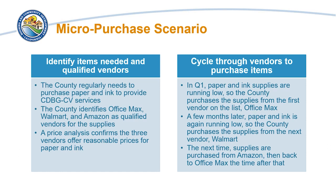In this scenario, the county regularly needs to purchase paper and ink to provide CDBG-CD services. The county identifies OfficeMax, Walmart, and Amazon as qualified vendors for the supplies. A price analysis confirms the three vendors offer reasonable prices for paper and ink. In quarter one, paper and ink supplies are running low, so the county purchases from the first vendor on the list, OfficeMax. A few months later, paper and ink are running low again, so the county purchases from the next vendor, Walmart. The next time, supplies are purchased from Amazon, and then back to OfficeMax the time after that.